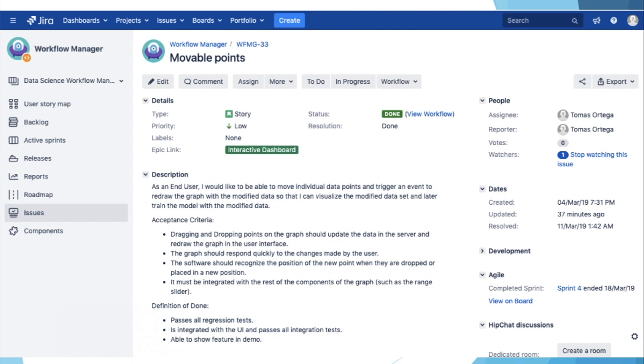This means the range slider and the slider used to move the points. The definition of done for this user story is: passes all regression tests and is integrated with the UI and passes all integration tests and must be able to be shown in the future demo during the review.